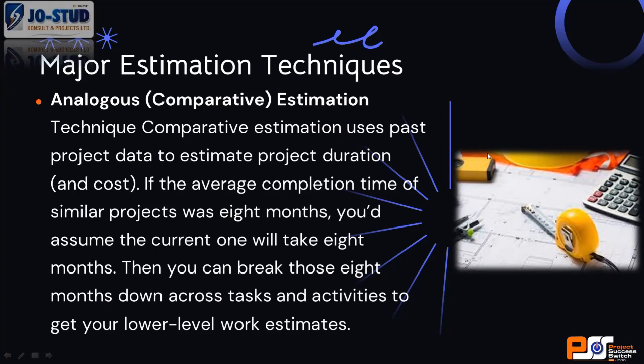So what I will now tell management or my client is that based on what I just did, 248 units costed me 1 billion in 6 months. I will now add something, because the one we are about to do, for example, is in a maybe waterlogged area. We need to introduce a column. It means my 6 months estimate, I will build something on it. But it's good for me to have that general idea. That's analogous.